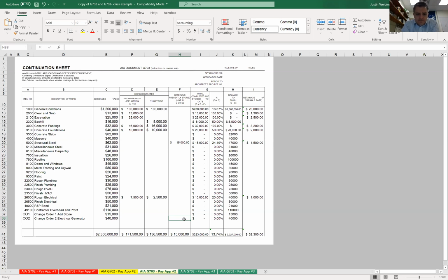And then in commercial construction, if you have subcontractors with large contracts, you're going to want them to follow the same exact procedures. So most of them will submit a G702 and G703 to you so that you can understand what they're billing for. That's why when we did our subcontractor writing your subcontract example, we had them provide a schedule of values on the roofing example that we did when we wrote our subcontract so that you can know what they're billing for as well.